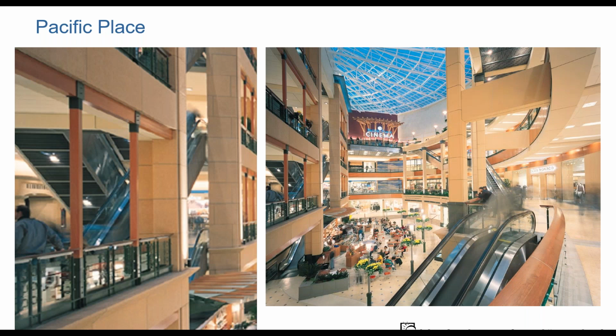One of the interesting things: we designed this to have its own separate standalone lighting control system. Of course, during the construction process, lots of things can change. The lighting control system as a separate element got value engineered out of the project. So essentially, lighting controls then fell into the lap of the HVAC system. I think it was Siemens, but I'm not 100% sure. It was a long time ago.